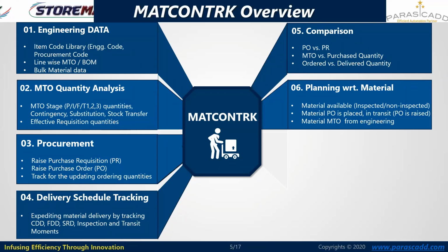Material purchase order, if it is placed, as well as the other delivery dates like the transit dates or the CDD, SRD, and the FRD dates. Next, material MTO from the engineering. So these all are the data sources considered during the planning procedures.